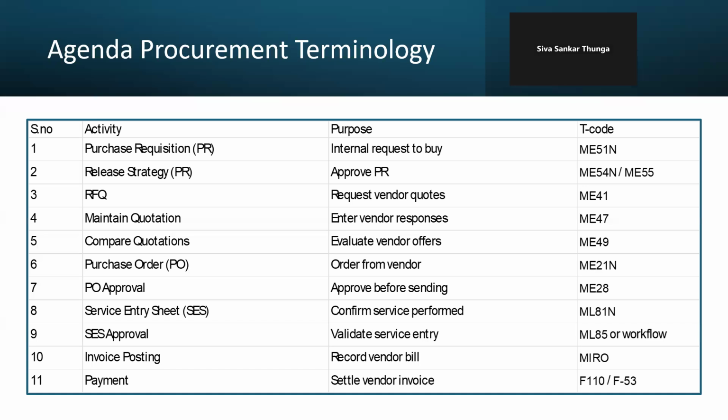That means there will be a verification with the field document, and once that verification is performed, they will approve this SCS. If there is any deviation in the quantities or the number of hours worked, or once the drawing is finished and completely approved, then they will approve this SCS. That is the SCS process.